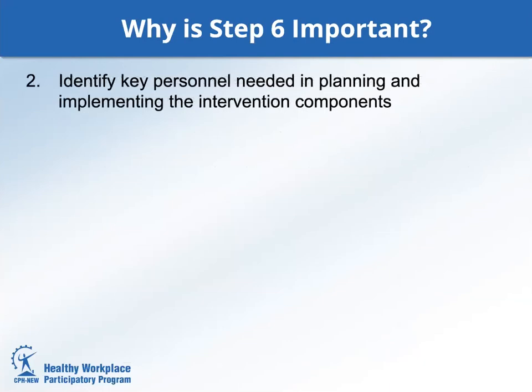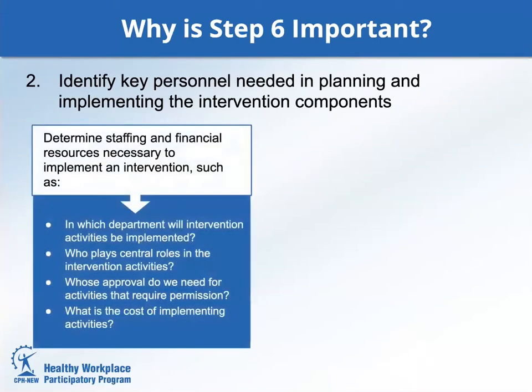Two: identify key personnel needed in planning and implementing the intervention components. First, determine staffing and financial resources necessary to implement an intervention, such as: in which department will intervention activities be implemented? Who plays central roles? Whose approval do we need for activities that require permission? And what is the cost of implementation activities—for example, vendors, equipment, training, personnel time, and existing resources within the organization?